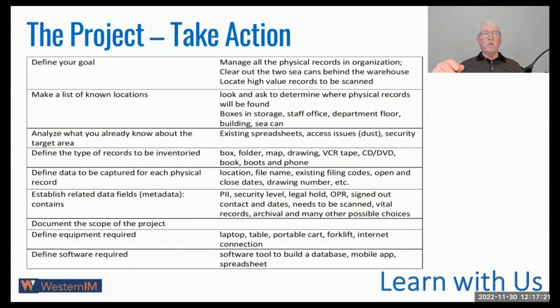Define the equipment required. Generally you're going to need a laptop, you're going to need a printer, and you're going to need a cart to put them on when you're doing the project. And absolutely define the software you're going to need to do the project. I will tell you right now that yes, you could probably do this with an Excel spreadsheet, get this metadata in and capture the information. But if you're doing anything of any size, I would guarantee you that you want to go out and find a great tool for this job.